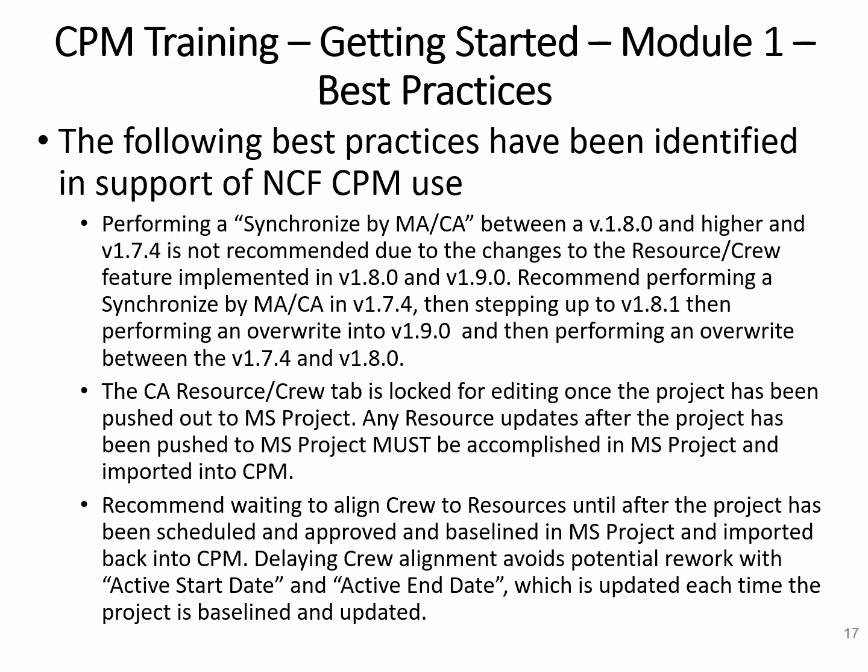It is recommended to align your crew after you have been scheduled, approved, and baselined in Microsoft Projects, and import it back into CPM. Delaying the crew alignment avoids potential rework with active date and active end date, which is updated each time the project is baselined and updated.